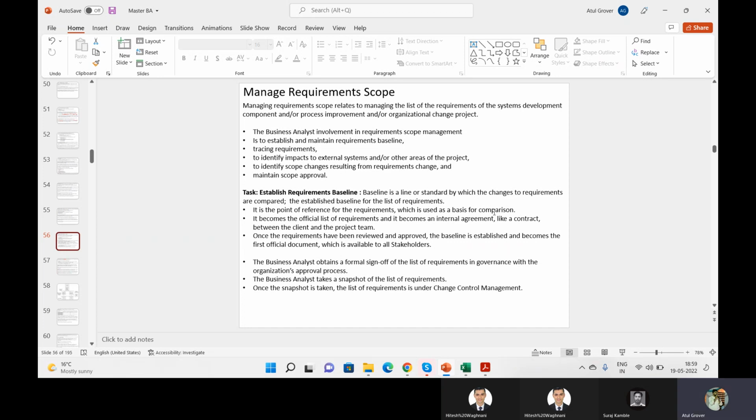Like one of my customers said, when I developed their first phase, he says, Atul, in this incident management, my assign to button is not working. Then I said, boss, it was not in the baseline. Means you said that you already have this functionality, so I did not touch that part. If it is not working, that's fine. I will fix it for you. But don't say that it is an issue in my development.